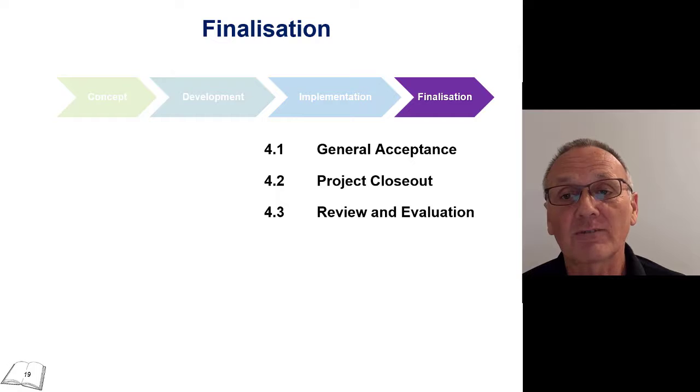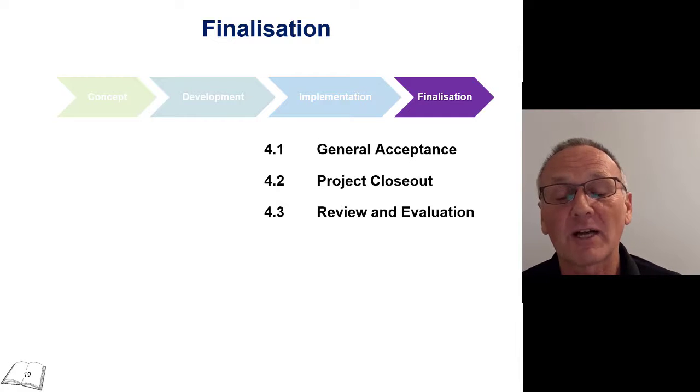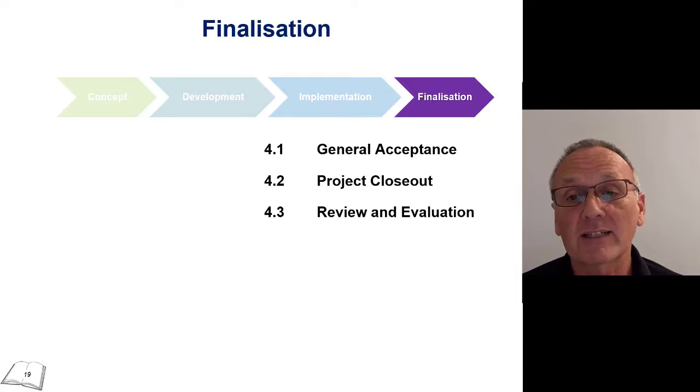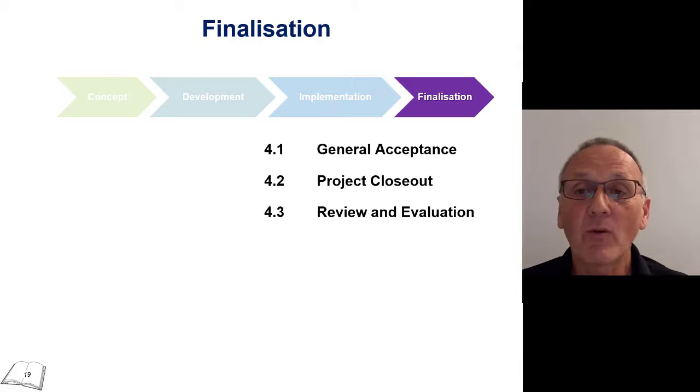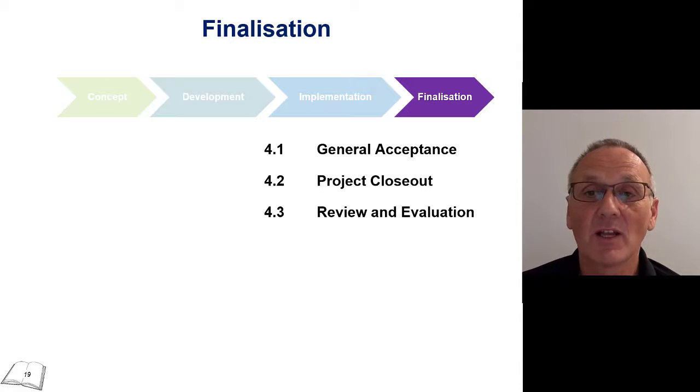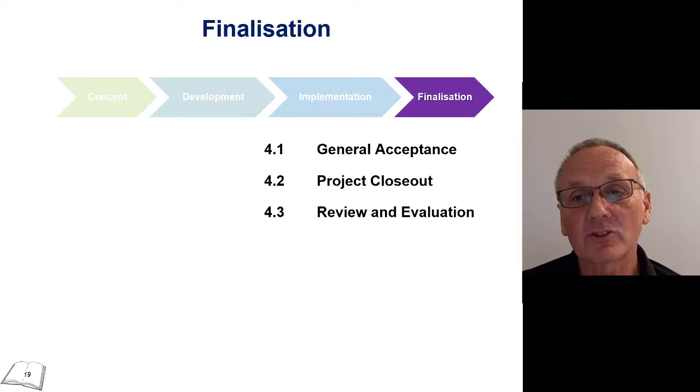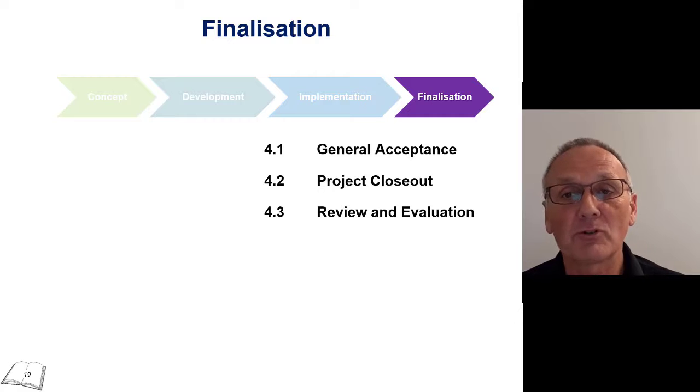The last part of project finalization is the review and evaluation. Normally, a project completion document is produced as part of this. We go through and we review all of the things that we've done as part of this project, and in the report, we actually evaluate what was done, what could have been improved, and what lessons did we learn. Now, I want to make fairly clear here that we do not learn our lessons during finalization. Lessons are actually learned all the way through the project.